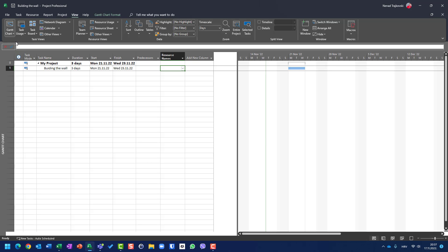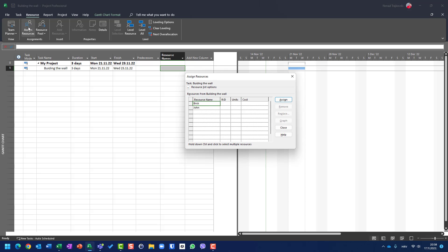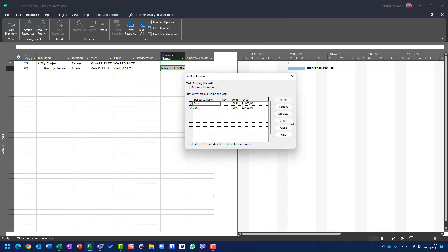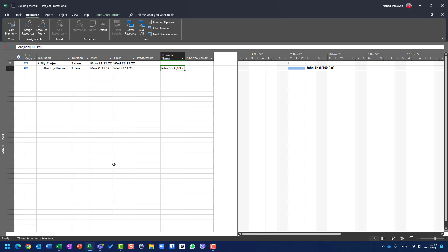Instead, I will use the Resource tab and Assign Resources. I need John — assign him — and I need 100 bricks. In the units field I will put 100, which is the number of bricks I need for this specific task, which is building the wall. Assign, and you see I now have 100 pieces.